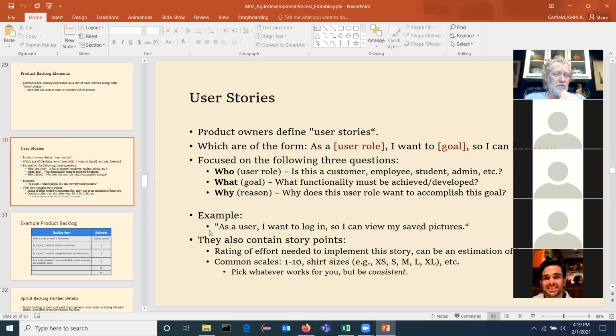It is also common after a sprint that you might actually add items to the product backlog. The product backlog starts out this big. It doesn't always go down. Sometimes you're like, oh, wait, now we have to do these other things. Okay, it goes up again, and then it goes down as you work them off. So the product backlog can change size and it can get bigger. And it's not uncommon for it to get bigger at least once during your process, because you're going to learn more about the product as you start to flesh it out, and so you have more detail about the kinds of things you can do.